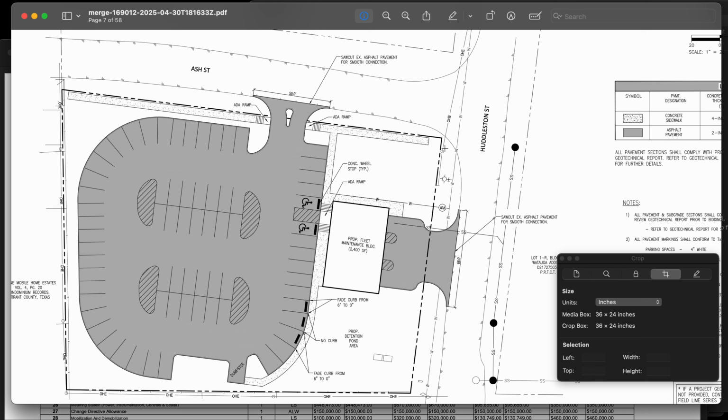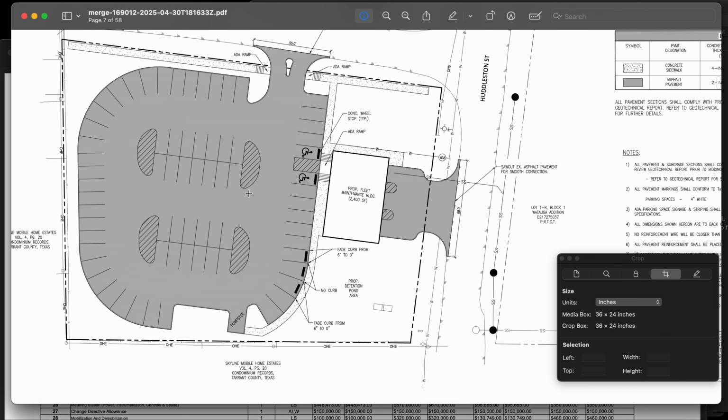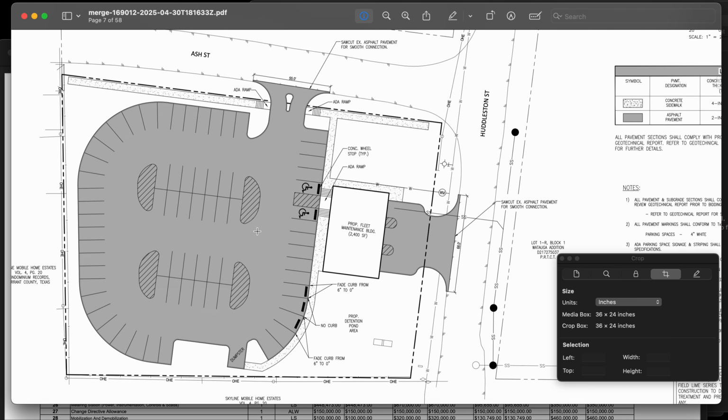As you saw, there was no demolition plan, but that doesn't mean that there's no demolition in this. There are 2 main things in the demolition. It's existing pavement, trees, buildings, old structures, concrete, curbs, all of that. And then there's stripping and removing the topsoil. That's all grassy areas, taking off the top 4 to 6 inches of grass. The majority of the job site is grass, so that is easy.